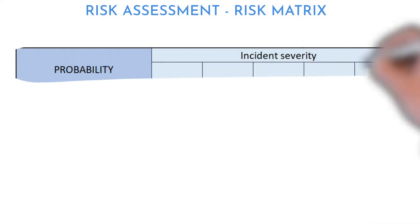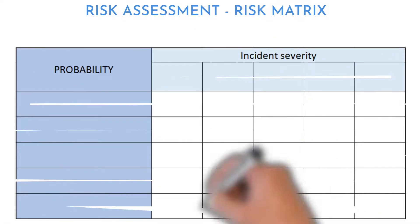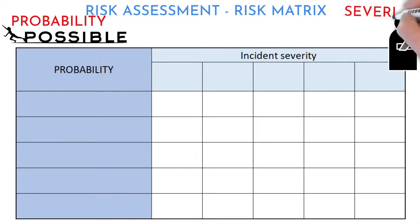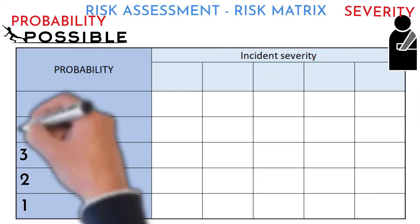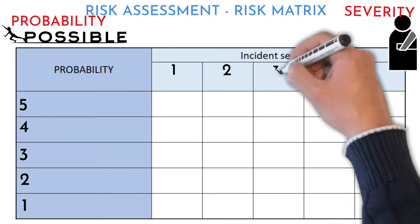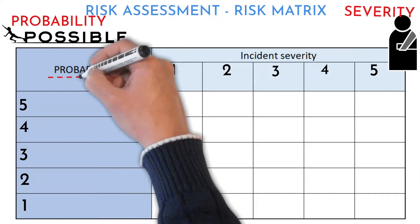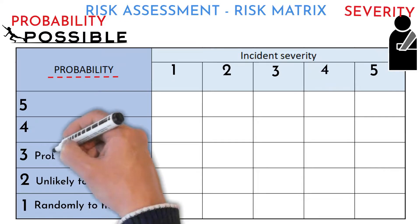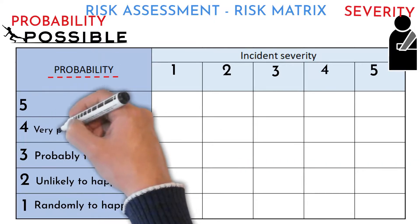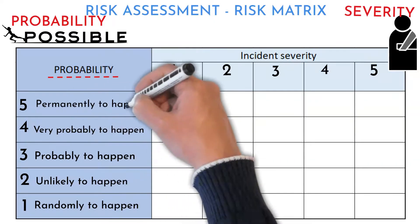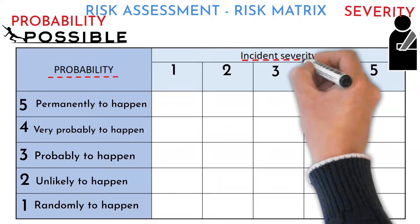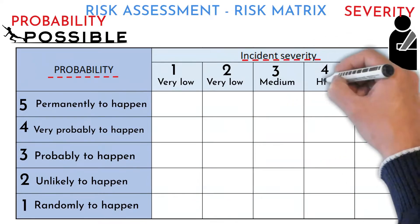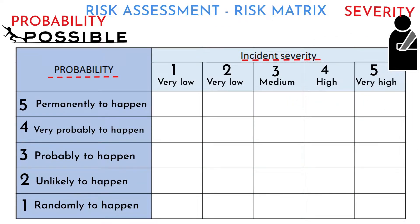There are two criteria in risk seriousness evaluation: incident probability and consequences severity. Each criterion has five categories. Probability categories are: randomly to happen, unlikely to happen, probably to happen, very probably to happen, and permanently to happen. Consequences severity categories are: very low, low, medium, high, and very high.